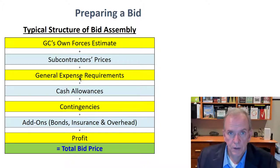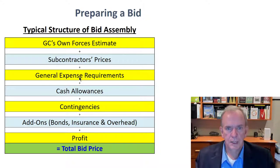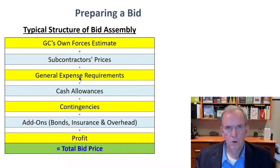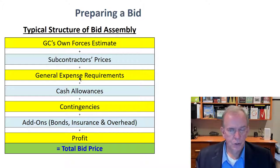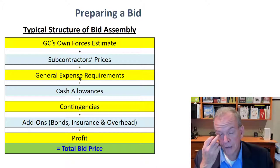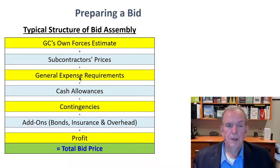You'd be surprised what I've seen on bids. We used to price a lot of public government projects and I was always the one to bring the bid in. On a public project, if it's due at 11 o'clock and the clock hits 11:01, it's no good — very strict, no jokes. Don't get stuck in traffic; make sure you're there ahead of time. I usually hung out in a coffee shop across the street on Yonge Street, just south of St. Clair, where we used to do a lot of our government placements.